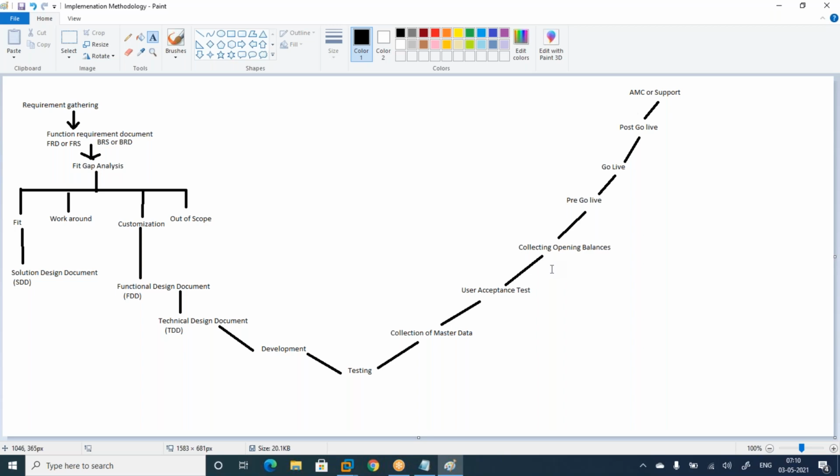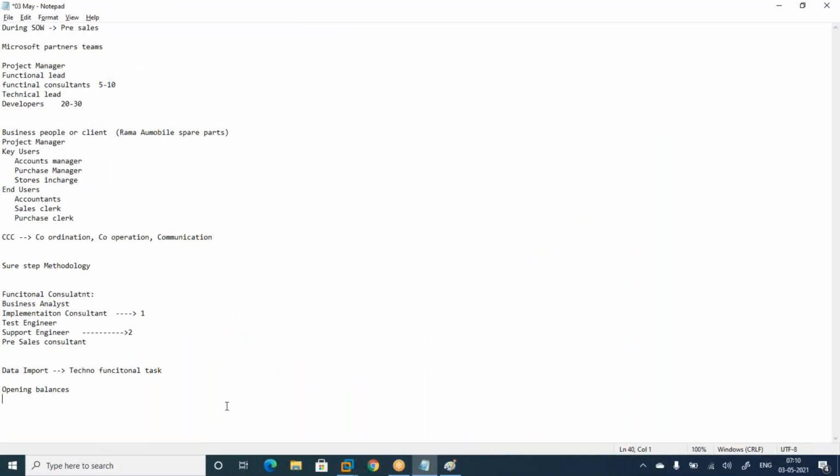Additionally, I would probably propose another level of test before user system integration. When you're looking at importing master data and opening balances, you would have an alternate environment. This goes to capacity planning, where you would probably have a sandbox and a conversion environment where you would get all of this data before you expose it to user acceptance.